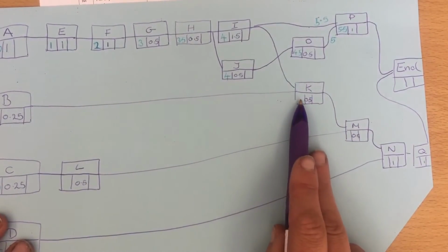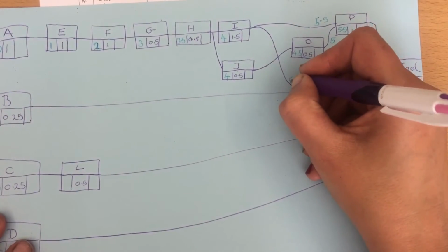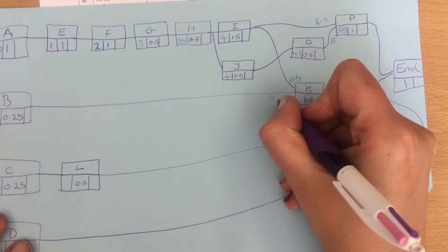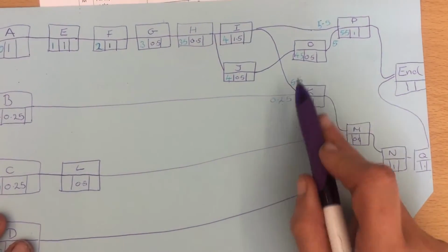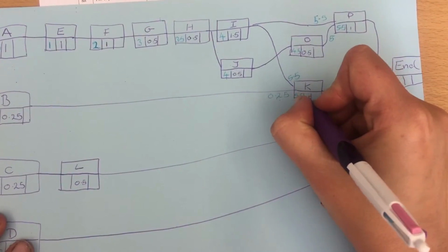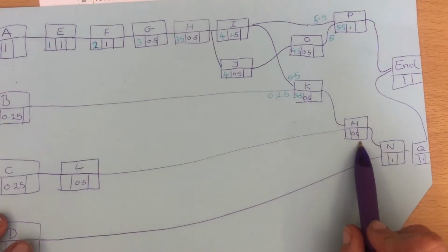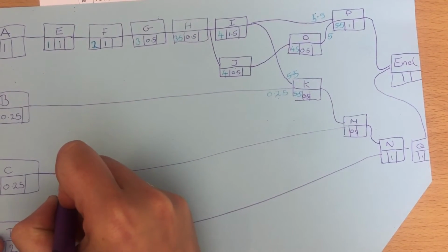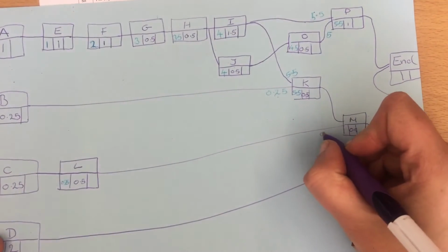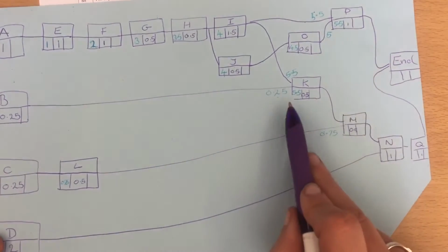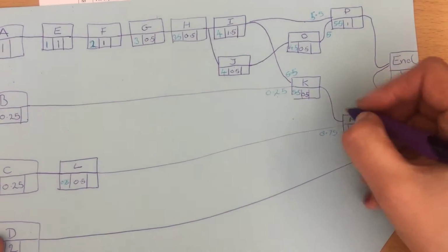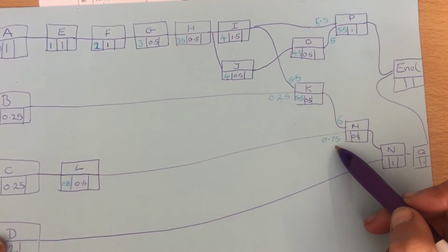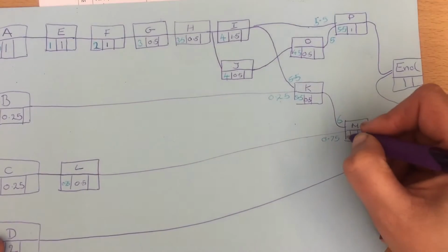So I also goes into K. So we've also got a 5.5 going into K, and we've got a 0.25. So we have to wait for the slowest one. Slowest is going to be 5.5. M has to wait for L. So L is going to have to start at 0.25. Add the 0.5 gives us 0.75. But we've got 5.5 and 0.5, so we've got 6 here. 6 hours is definitely slower than 3/4 of an hour, so we're going to have to wait for that.